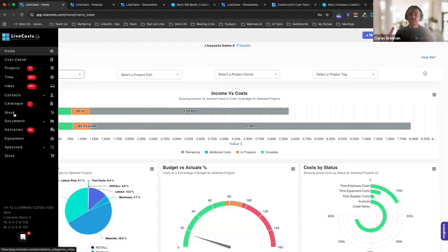So what they used to do is use stock, whereby the container lands on the project. That's a cost now to the company, but it's not a cost deployed onto the project just yet. So it sits in stock. And then as that insulation is being drawn out of the container and used on different areas, we can distribute it accurately onto the project, and accurately against, in their case, different house types. So we can land it in stock as a cost, hold that cost as a project cost sitting in stock, but not yet distributed into the individual phases.